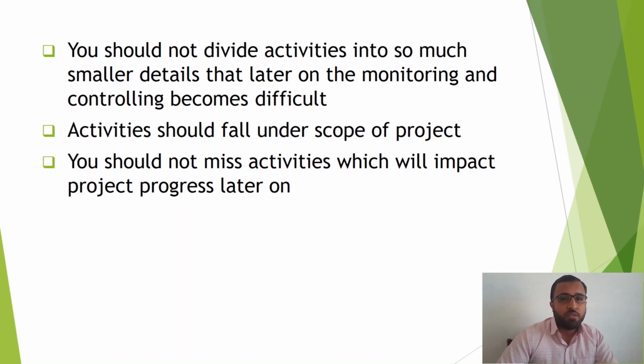Then we miss the progress of the project. And if some delay has happened on that task, later on it will be very difficult to record that delay. So it is very important that the activities we are adding are within the scope of the project. We should not add an undesirable activity which is not part of the project, and we should not miss any activity which is part of the project.